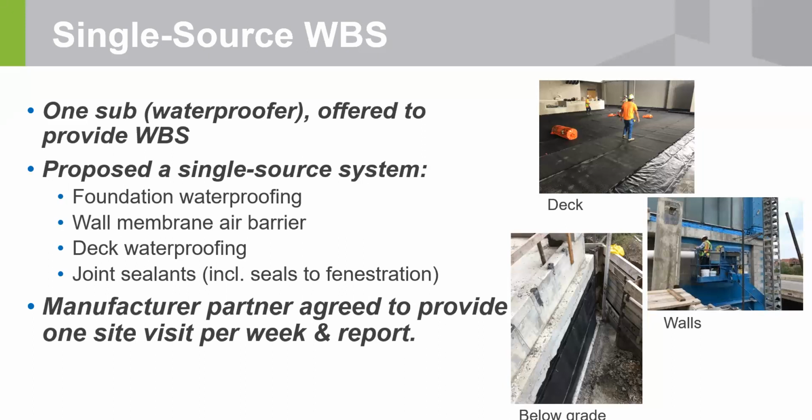Now, to do that, Alpha, who we've done business with for a long time, and the material manufacturer, which is my employer, we partnered with the installer and we agreed to provide one site visit per week and a report. So again, this is just to make sure that as we build this thing, everything is tight and we don't see any reason why it should fail that whole building test once we get there.